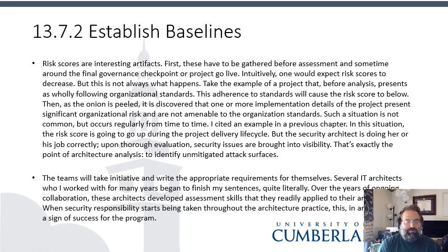13.7.2, establish baselines. Risk scores are interesting artifacts. First, these have to be gathered before assessments and sometimes around the final governance checkpoint or project go live. Intuitively, one would expect risk scores to decrease, but this is not always what happens. Take the example of a project that, before analysis, presents as wholly following organizational standards. This adherence to standards will cause the risk scores to be low.